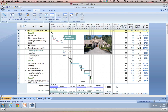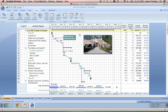You'll also notice that we've put milestones into our schedule. If you have points of time in your schedule that you want to mark off when things need to be completed, you can put milestones in for them. In FastTrack you can use a bunch of different options for these milestones — from something as simple as a square, diamond, or circle shape, to something a little bit more complex like a dollar sign, all the way to actually inserting your own images to use as milestones. You can also put text boxes directly into the Gantt chart, and use handy arrow keys to have the text box point to specific parts of the project it applies to.